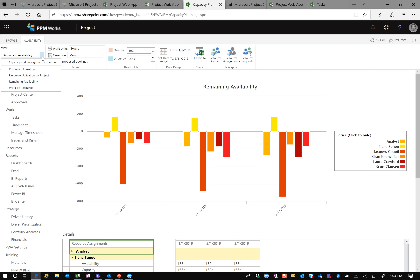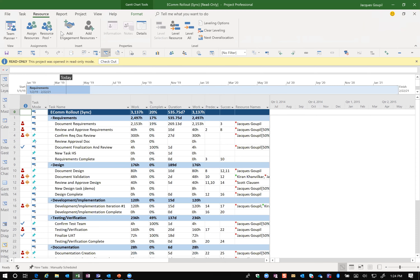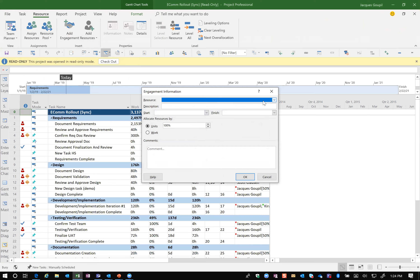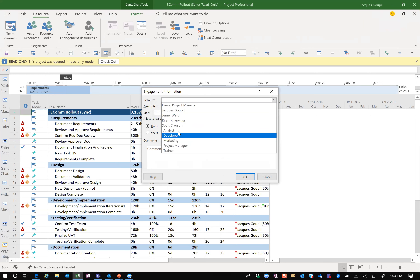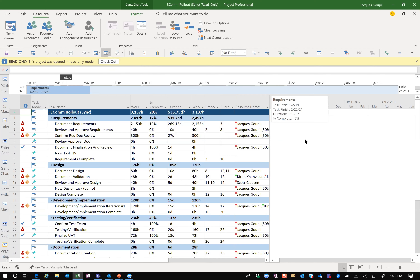Within the tool you first create your resources, then go in and add a resource engagement — specifying start and finish, and 25% or 50% allocation — and send that off to the resource manager. We've shown how a resource manager can create engagements, how a project manager can create them, and how to review resource availability and utilization. That covers the first topic: top-down planning and getting data into the system.